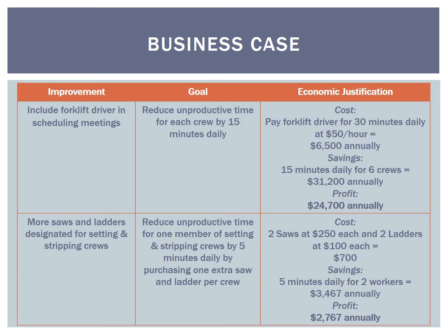Finally, purchasing more saws and ladders is the only recommendation that requires an upfront capital investment. It was assumed that the saws and ladders would need to be replaced annually, but if this is not the case, the profit could be even greater than that shown.